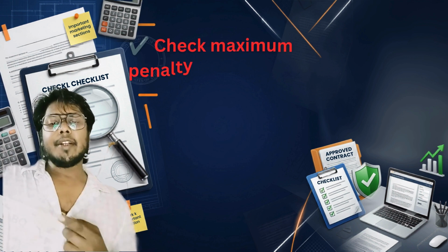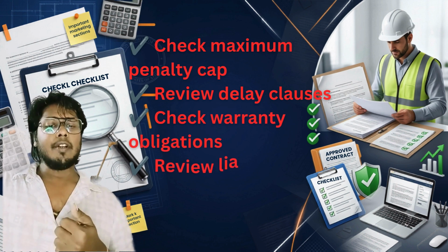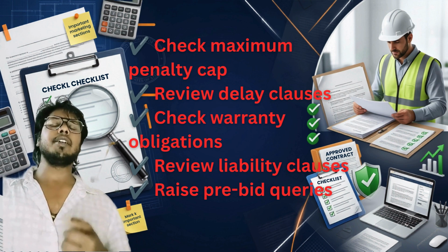Before submitting any bid, review every penalty clause. Check whether deductions are capped, understand warranty obligations, and ask questions during the pre-bid stage if any condition seems unfair or unclear.